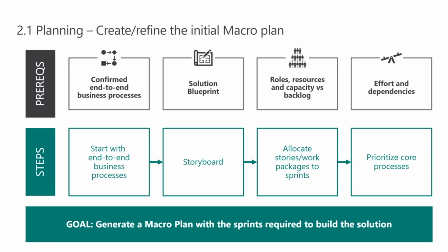This is what 80% of the time we do. And then towards the end, we're going to add on this process, which is infrequent, is important to the business. We still need to deliver it, but it's not as frequent. It builds on top of the core process. So get the core process working before we add on the bells and whistles or the variants that are more complex than the core process.